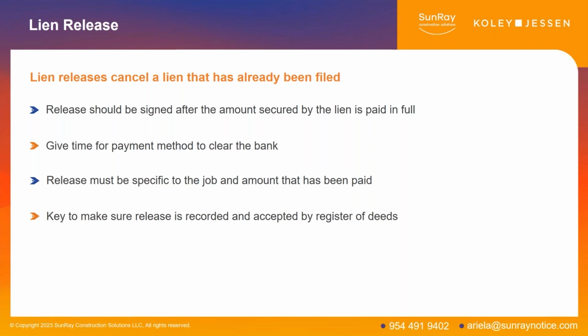Additionally, consistent with Dan's initial overview, we want to be very specific about the job and the amount that you were paid and that you are releasing from the lien. It's very important to get these details right so that you don't run across a bad actor who takes a more open-ended release and tries to construe it in a way to take more than you had intended.